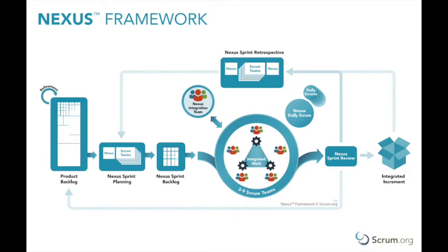Third, software and test artifacts. The requirements are or will be instantiated in software. To the extent that requirements, team members' knowledge, and software artifacts are mapped to the same Scrum teams, teams can reduce the number of dependencies between them. When software delivery using Scrum is scaled, these dependencies of requirements, domain knowledge, and software artifacts should drive the organization of the development teams. To the extent that it does, productivity will be optimized.